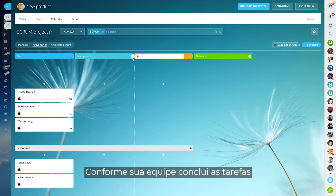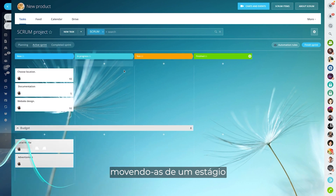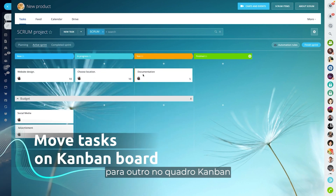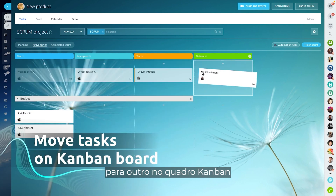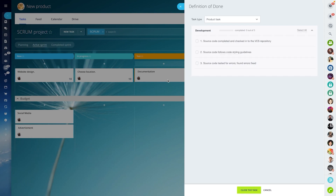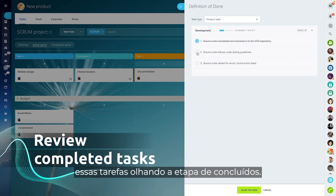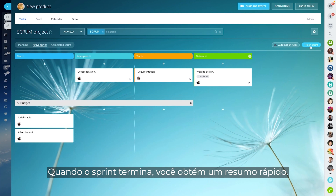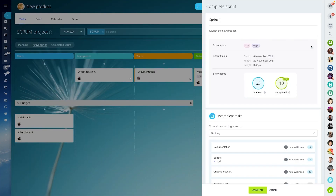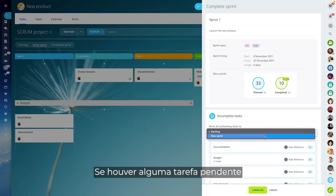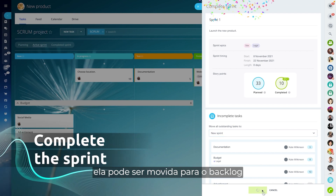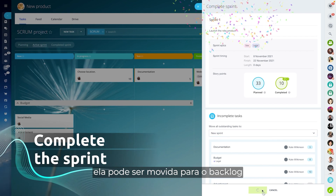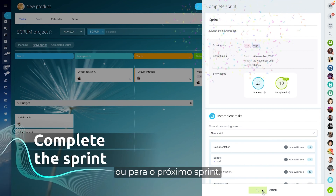As your team completes their tasks, moving them from one stage to another on the Kanban board, you can review these tasks based on the definition of done. When the sprint is over, you get a quick summary. If there are any outstanding tasks left, they can be moved to the backlog or to the next sprint.